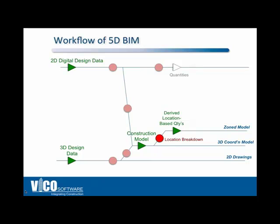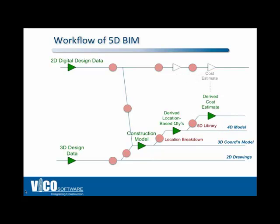The next step is getting ready for cost estimating. On the 2D product line, that's linking those quantities to a cost estimating database. On the 3D line, we link them to what we call a 5D library. It has the cost and assembly information you're used to in estimating, but also task duration-specific information. This means if you're a 2D user, you've now got enough to generate a cost estimate; if you're a BIM user, you've got costs derived from a 3D construction model. The next step in 2D is to prepare a schedule — usually an independent, unconnected task. In the 5D BIM workflow, you derive a flow line schedule from exactly the same model data and 5D library parameters.